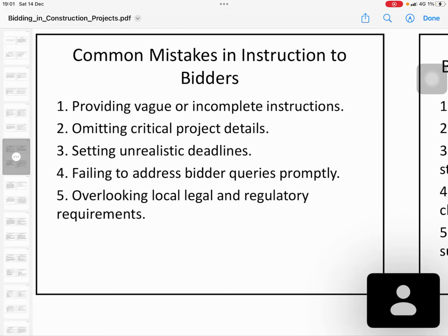The main contractor has to support the laying of the turf. It's a part of his scope, but the project duration is 45 or 60 days. By the project completion time, turf manufacturing had not started, and they also requested 45 to 60 days for the freight time. So the deadlines are unrealistic.